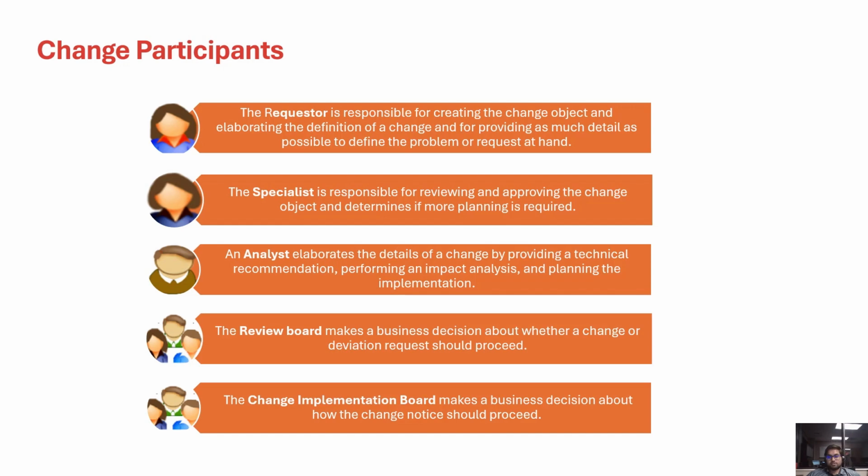Then we have the specialist. The specialist facilitates and manages movement of the change through the appropriate process. The specialist is responsible for reviewing and approving the change object and determining if more planning is required or not. And then we have the analyst. The analyst assesses the technical feasibility of the change. The analyst provides a detailed plan of how to implement the change.